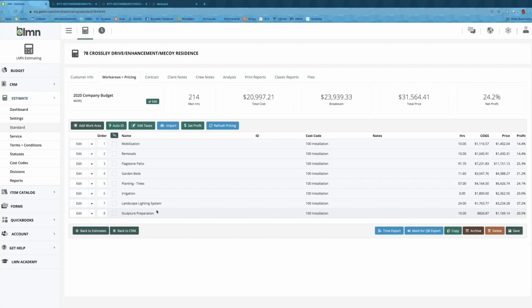But personally, where I've recovered the bulk of that cost has always been in my budget. So I'm not building warranty in specifically throughout the estimate as much as I am in my budget. That way, my markups on everything I do throughout the year recover that labor. And the materials, as I've shown you, I've built into the system. So when I'm building my budget for the year, under overhead, I've always added a warranty labor line item. That way I'm recovering that time throughout the year.